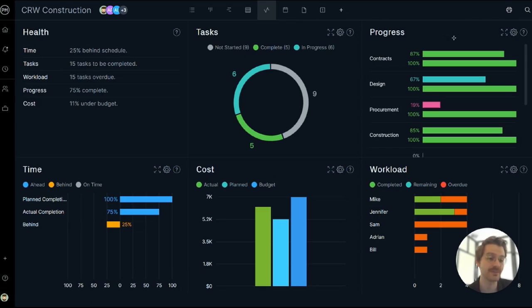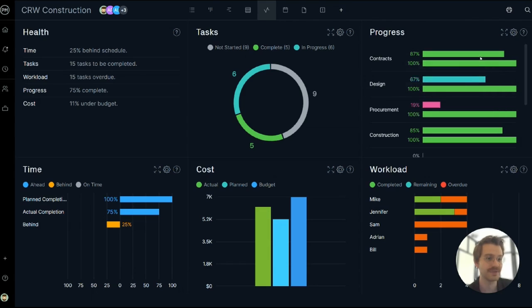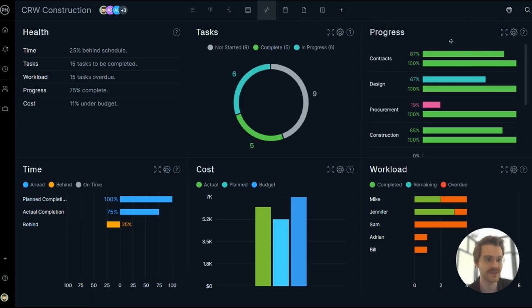The progress panel compares your planned completion compared to your actual completion. So right here you can see that it was expected to be 100% complete by today, but in fact it's only 87% complete. That shows it at the task level.